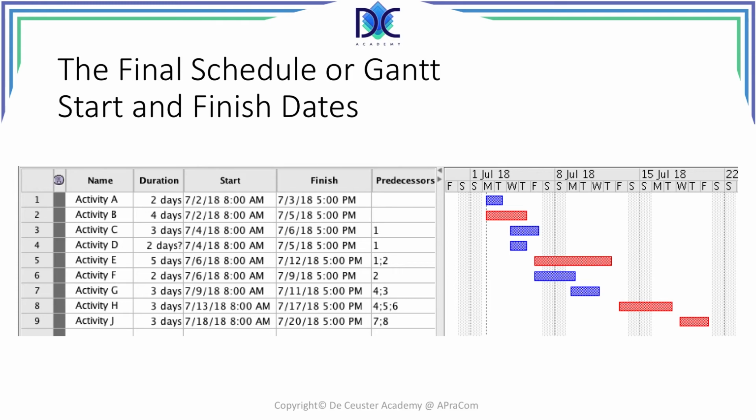Now, how did we put the link between those activities? We can put the cursor on an activity and drag a link to the successors. That's what we did, but you will be able to see that better when we will be looking at the live demonstration. Here, all the predecessor information is completed and the Gantt chart is finished.